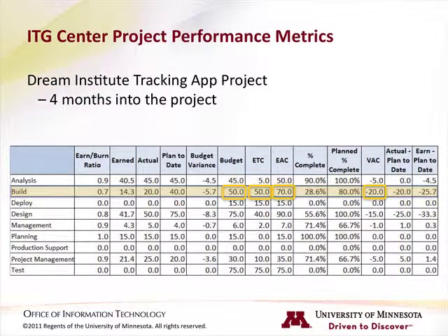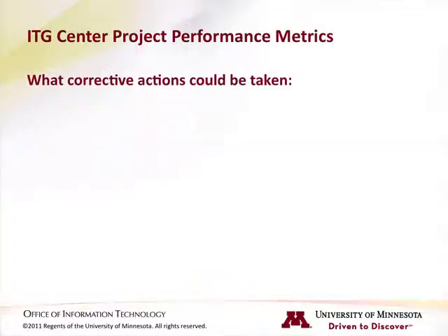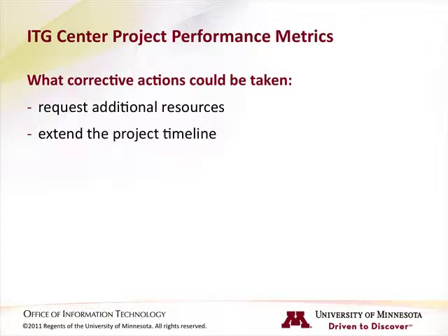Jane Redding, the project manager, has been informed that a team member who has been out will now be taking an unexpected family leave. Jane needs to decide the best course of action to take to get her project back on track. Are there additional resources available that could step in for the absent team member? Can the timeline for the project be extended to accommodate the delays?